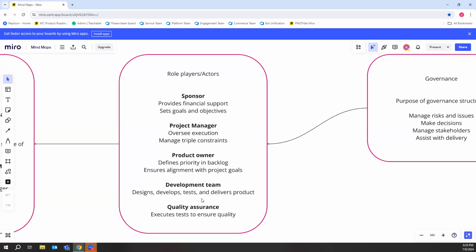It is important to view those capabilities that you need, identify the people, and view them as part of your project. Do not view them as stakeholders. It's very important that you do this because once you do, they divorce themselves from the delivery of the project and you struggle to get hold of people and you struggle to get time with these capabilities that you need. What I advise you to do is when you do your RACI and when you set up your governance, make sure that those people are available when you need them, right?